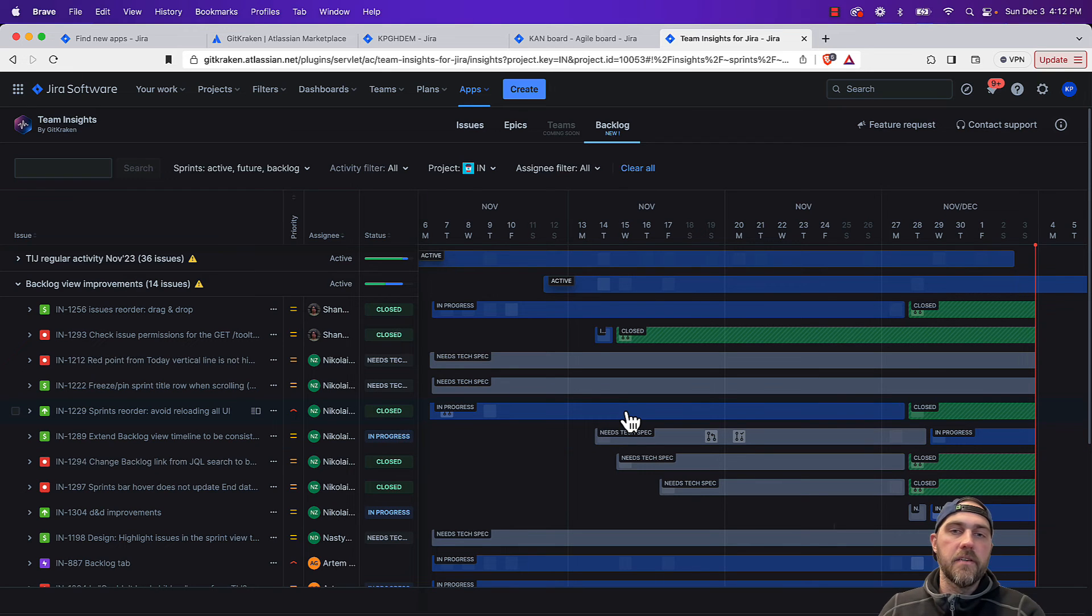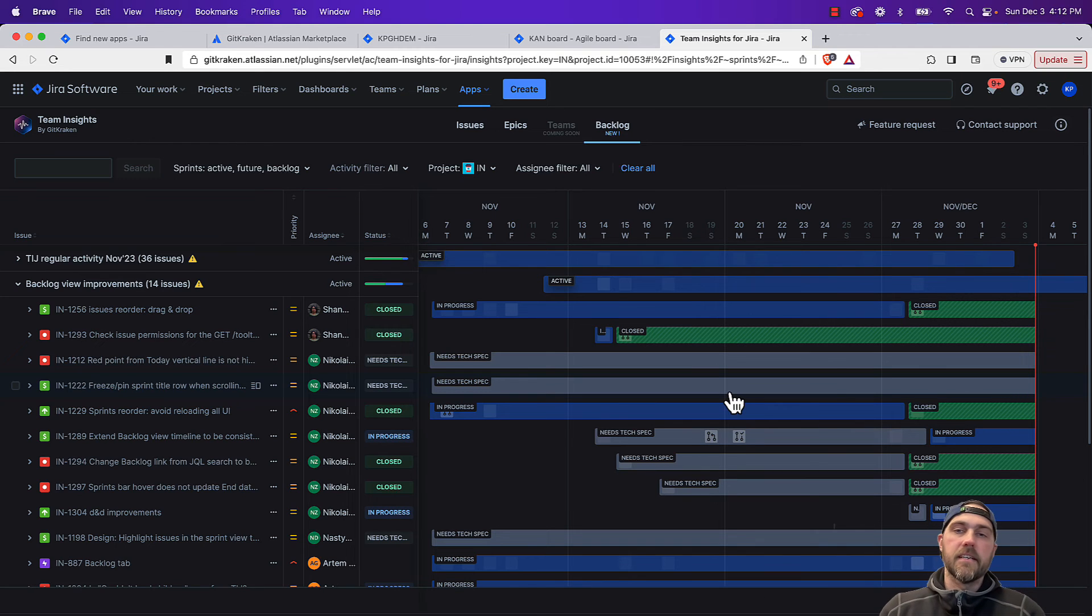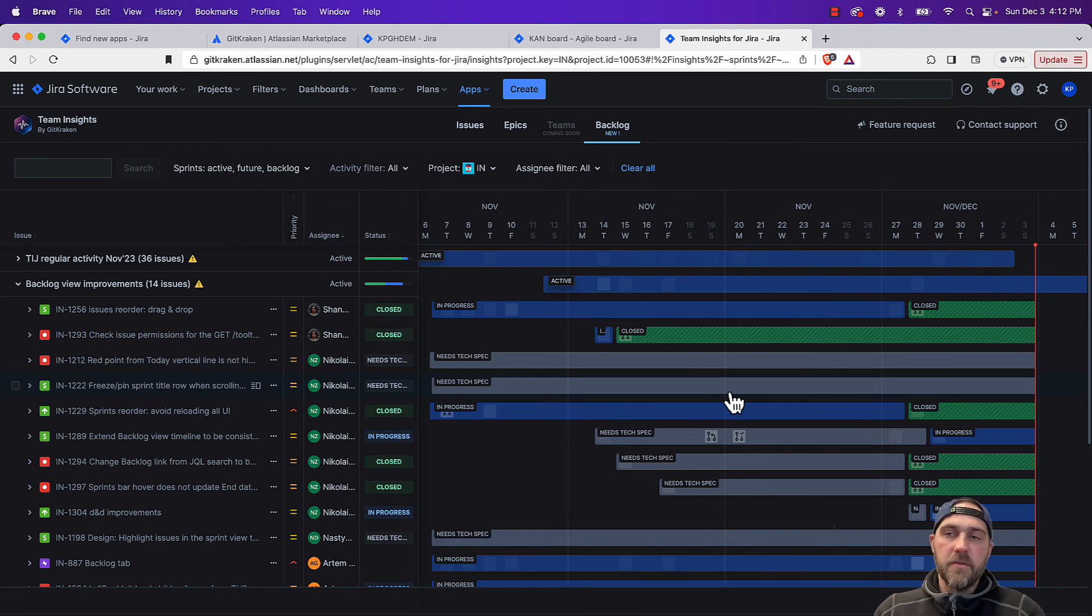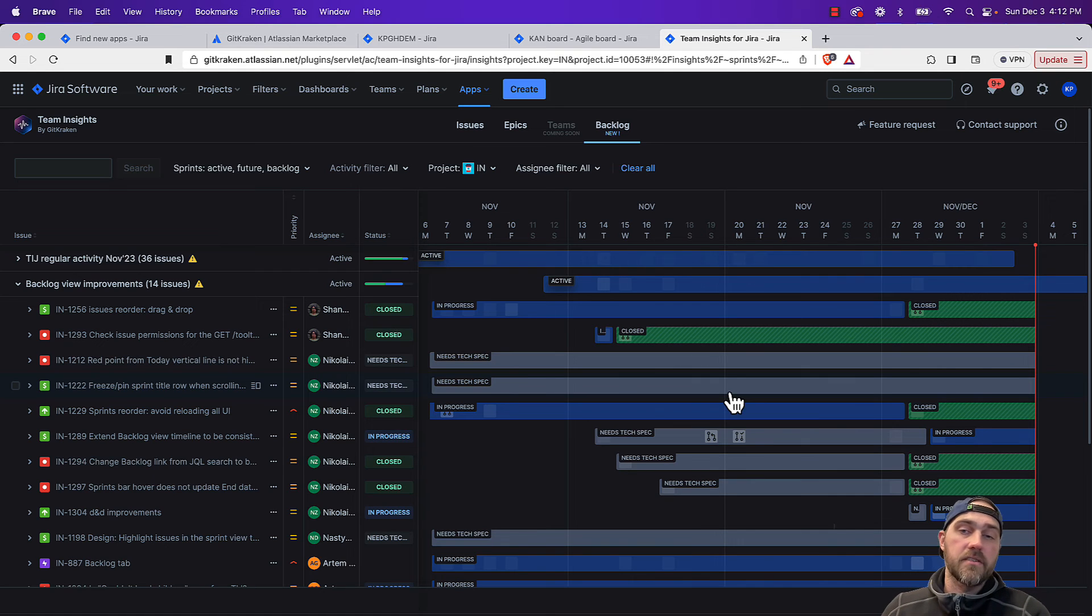So if we see no activity on an issue, that means no one's making a commit, no one has made any comments. It's a really easy way to spot check and see issues that are at risk or what needs attention.